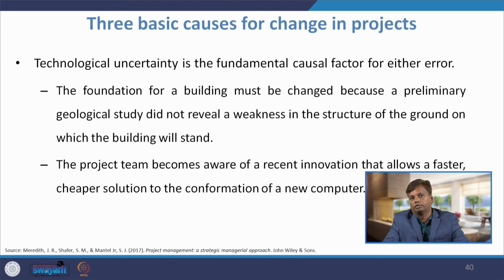Now there may be a new technology to see the weakness of the ground. That says that this foundation is not good enough. Now, we have to change our requirement. Second, the project team becomes aware of a recent innovation that allows a faster, cheaper solution to the configuration of a new computer. So, when there is a technological development, then we need to change the project objectives.